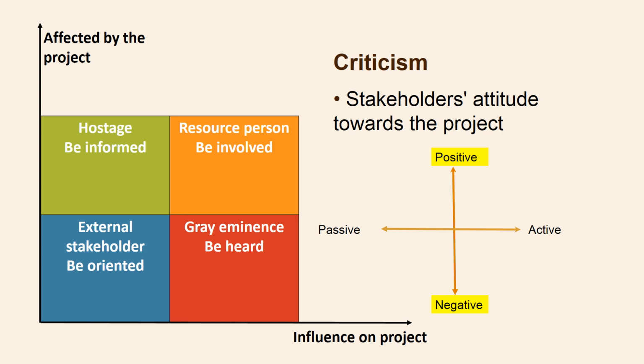The various stakeholders can be both negative and positive towards the project, as well as active or passive in their attitudes towards the project. Let's take a look at another example. Our warehouse employees are positive and active. They are moving into a new building. Production people are negative. They must move into an old building. You must be able to predict whether their attitude will be reflected passively or actively.